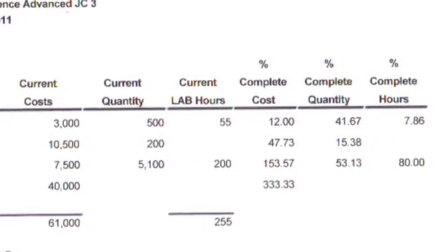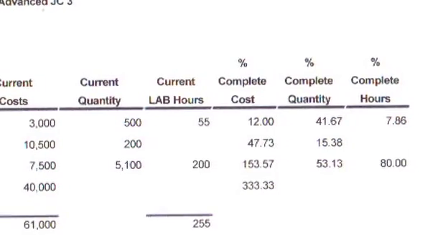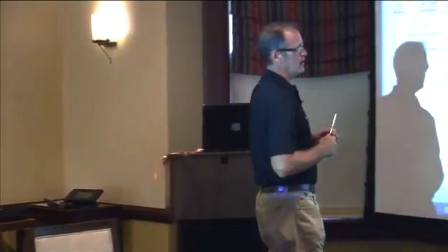Quantity reporting is the pinnacle of job cost reporting in my mind. Quantity reporting allows you to go in and say, not only did it cost me this much, did it take me this many hours to do it, but this is how many I did, all right? I can look at someone's system that did quantity reporting and be an estimator tomorrow, and I will make money on every job, right? Because there is an estimated cost per quantity for installation.